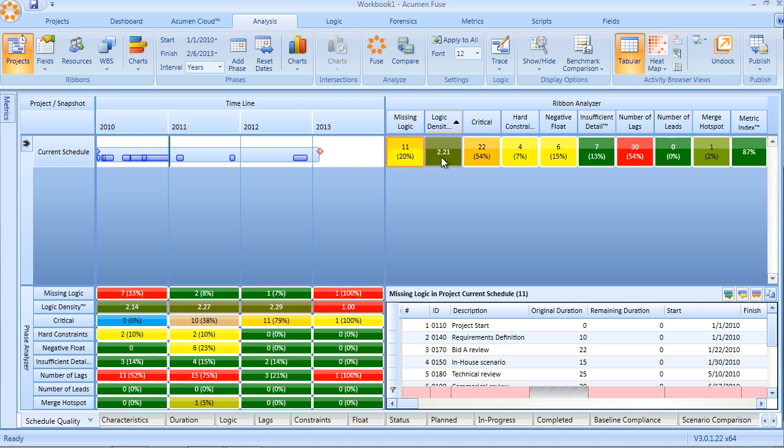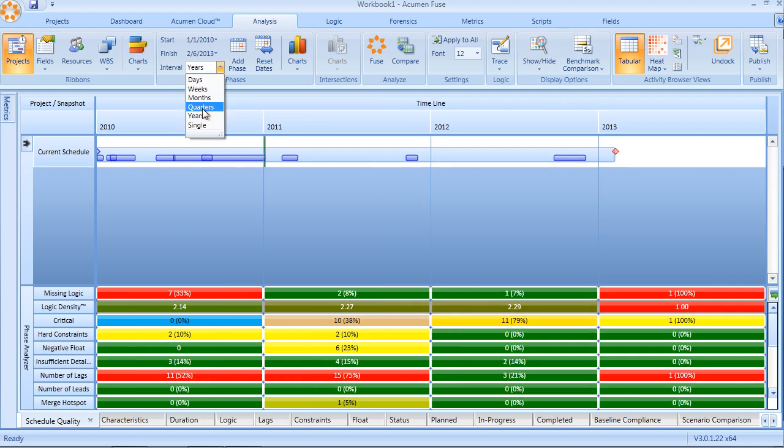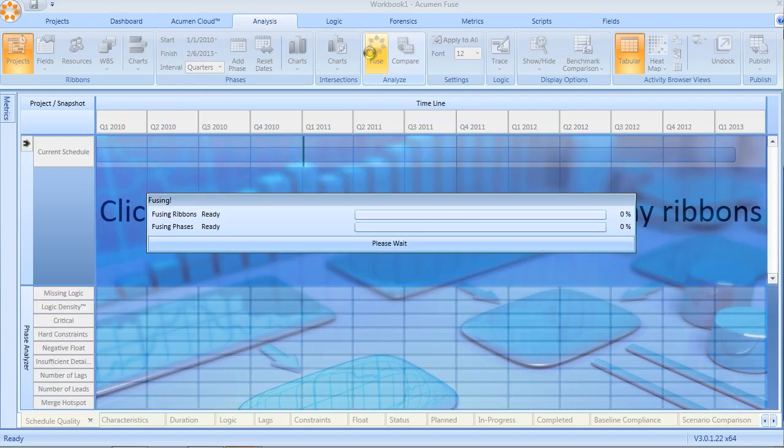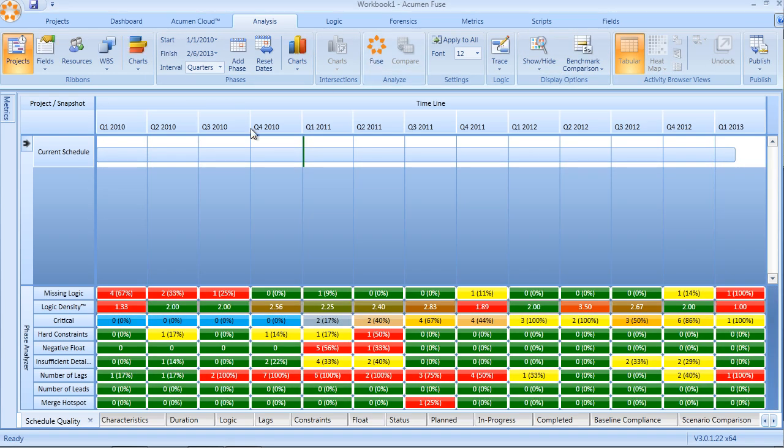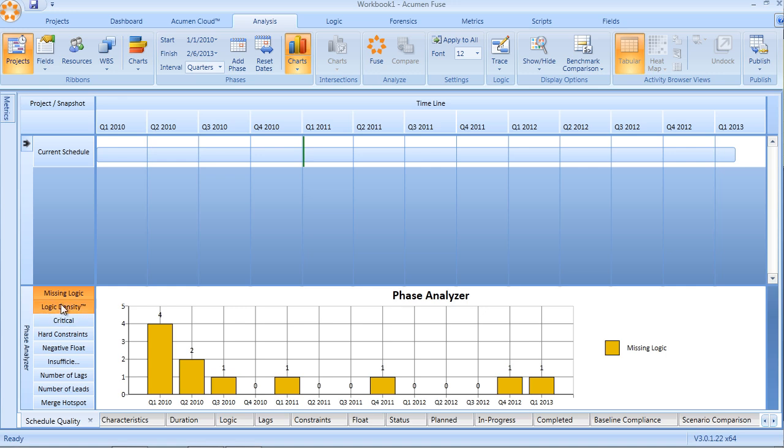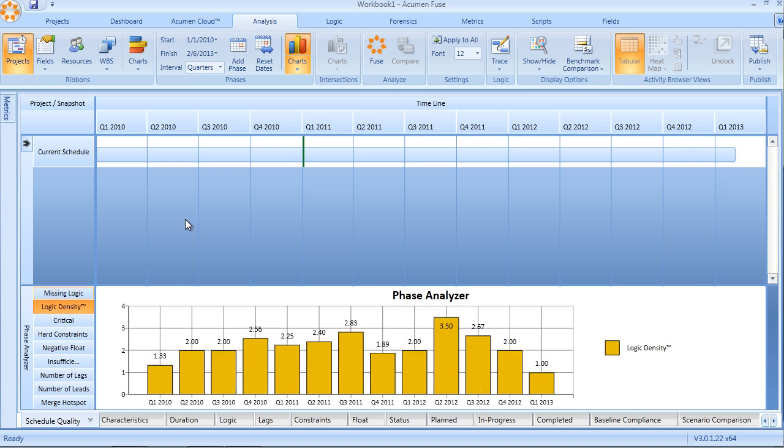This 2 to 5 range is an excellent means of critiquing and understanding whether or not your schedule has sufficient logic, or perhaps it is overly complicated in the amount of logic that it contains. An effective way of using logic density is to actually use the phase analyzer in FUSE and zoom in by a specific timescale, in this case quarters, and look at logic density and see how it varies over time, showing it in a graphical format. Here we can see the logic density is lower than the magic number of 2 in the early phases of the project.